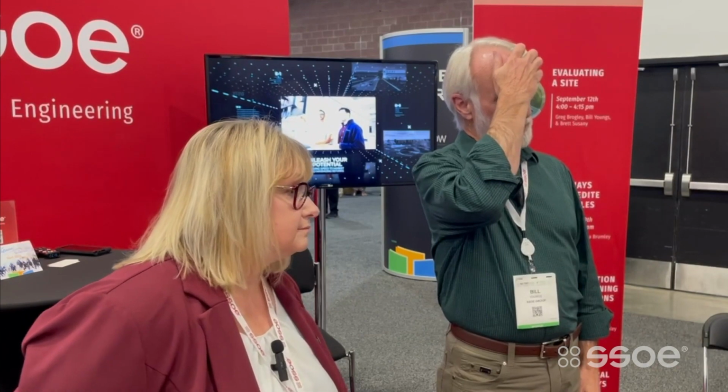And then it's back to what I was talking about earlier, is if it's going to be a change, we have to put that as a risk, and then we have to manage that and figure out what the costs are, because we can't always go out and hog out a hole in the slab and put it in. And what is that in time and schedule? It's usually not the cost, it's the time on the schedule, because everybody wants to get product out at a certain time. And so schedule is king, not so much the cost. Although we are going through some value engineering on some of our projects. Imagine that.